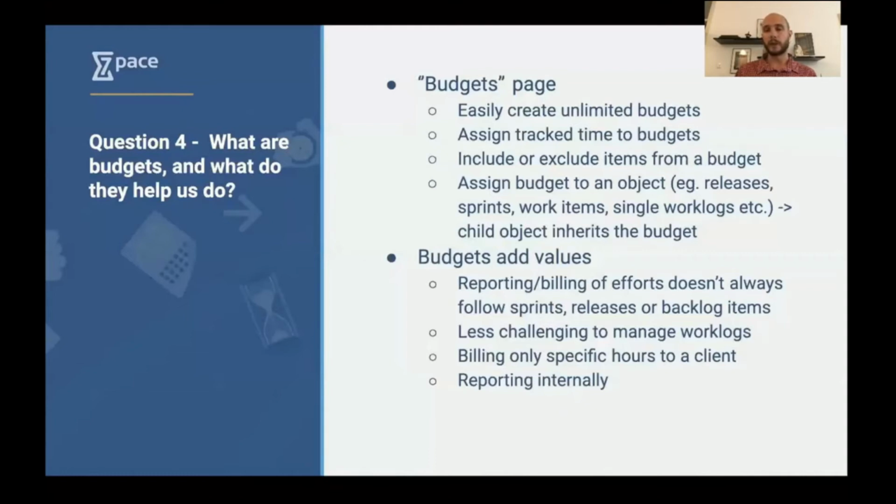Basically, with budgets, rather than creating a list of things you want to keep an eye on and then manually check and calculate the overall effort, you can just create a budget and then cherry pick the backlog items that you want to keep an eye on, so that then you can navigate to our budget area inside 7-Page Timetracker in Azure DevOps, and get all the information that you need.